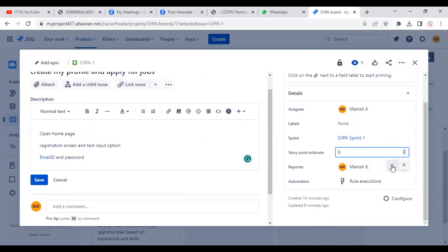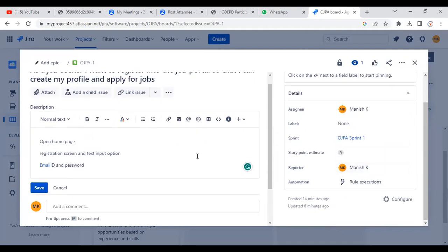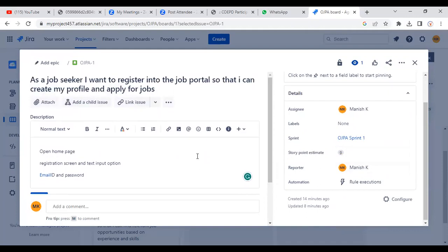Normally, to whom will these user stories be assigned in a project? See, when we are prioritizing user stories in the sprint planning meeting, the product owner and the development team will decide. The development team is also involved, and the development team will work on these user stories. The Scrum Master and development team, everyone will access these stories, but the acceptance criteria will be given by the product owner. The product owner basically writes this acceptance criteria.